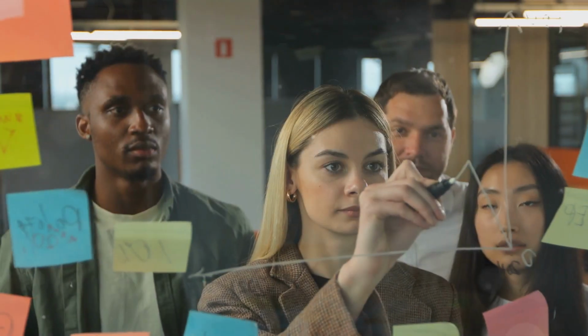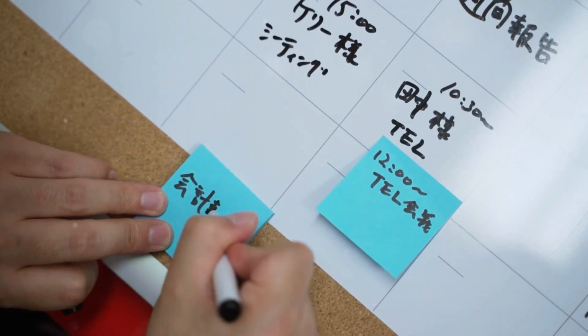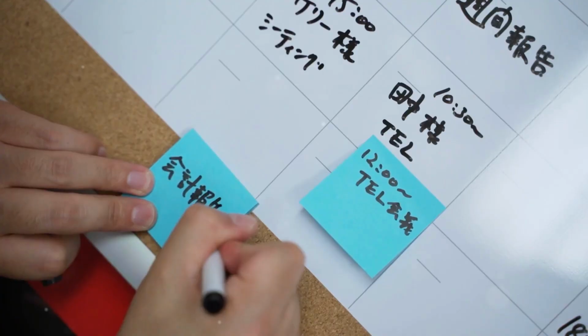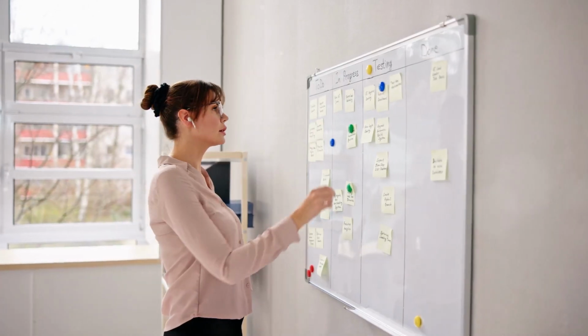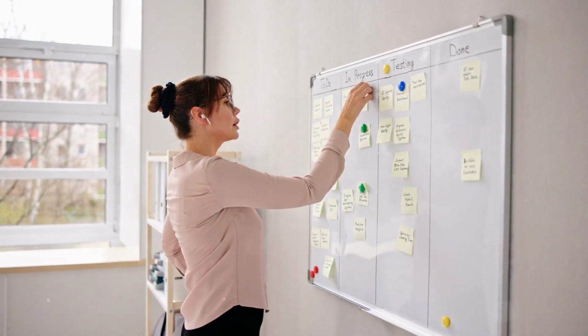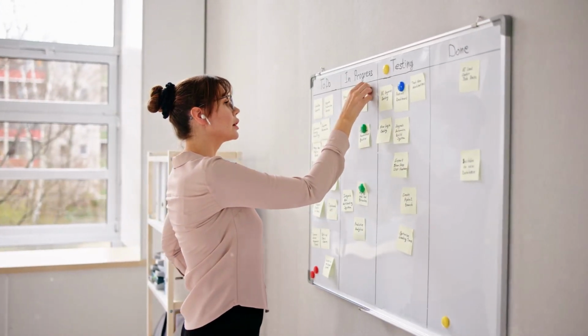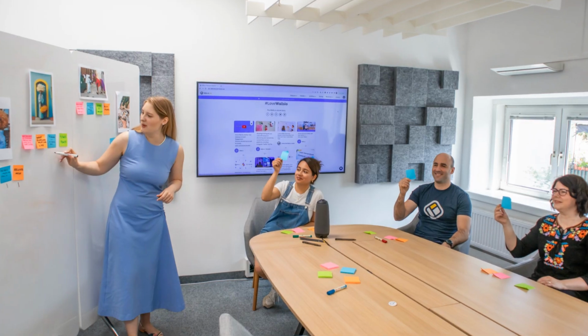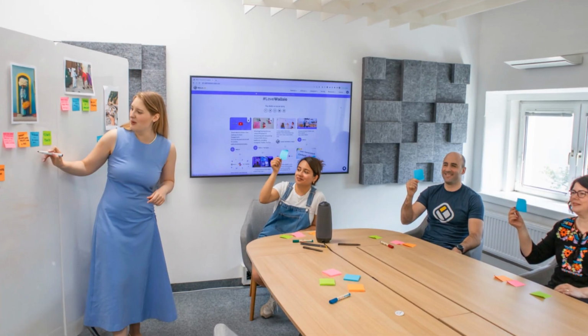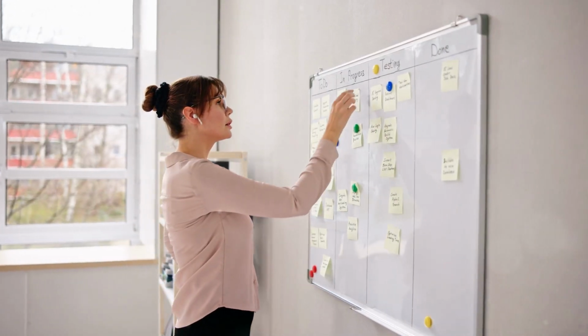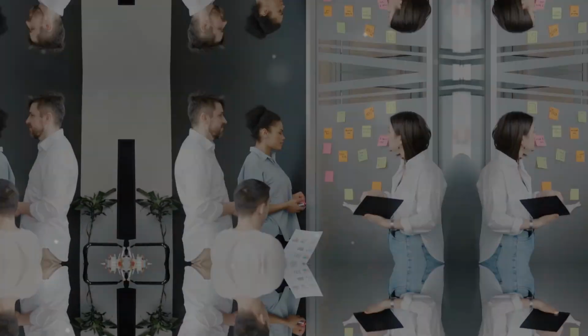Tags can also indicate levels of readiness, so a story might start out with a draft tag when it's first written, then move to refined once it's been clarified during backlog refinement, and finally get a ready for dev tag after it meets the team's definition of ready. This progression makes sprint planning a whole lot smoother because only fully prepared stories will be considered for commitment.